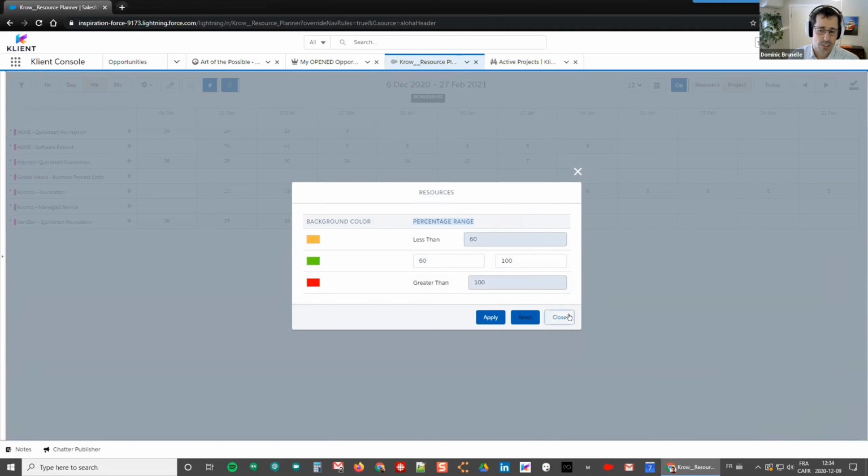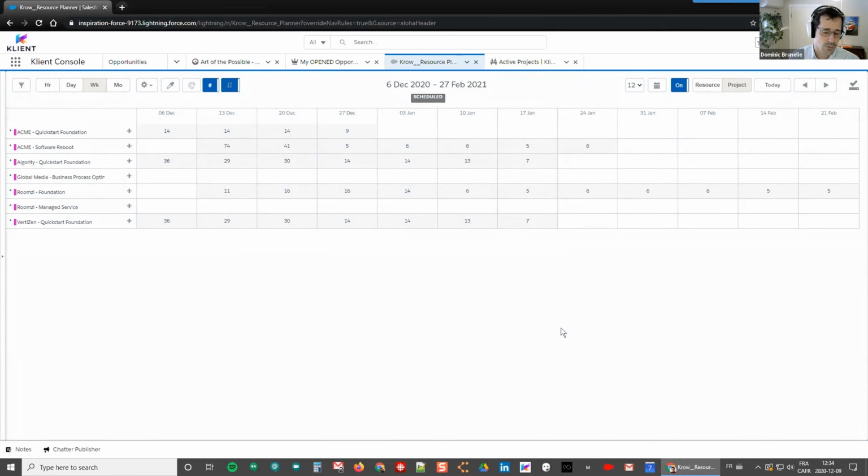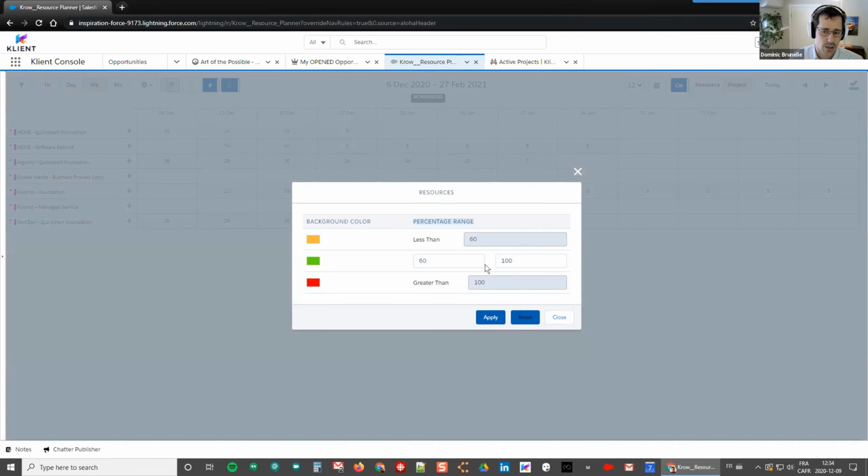So if you're using a person at 75% of their work week, that means they would be there for 30 hours a week. If they're booked for a total of 30 hours, then they would be marked as 100%, and the color code would be according to that. We can deep dive into it when we get to planning and scheduling, and more in project execution, but it's based on the target utilization percentage.